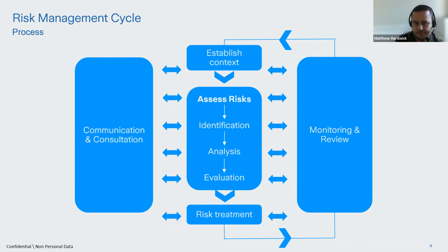So that's when we get the matrix out. We start to consider the likelihood of it, the probability of it. We evaluate this risk. We start to consider what's already in place in terms of our actions, but then what's our current score, and where do we want to get this to? What's our ambition of managing this risk? Where do we say that this is now comfortable?